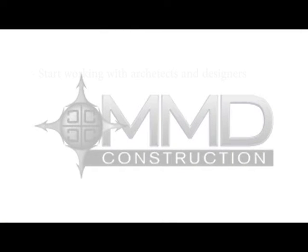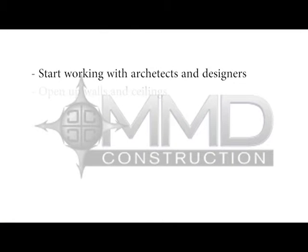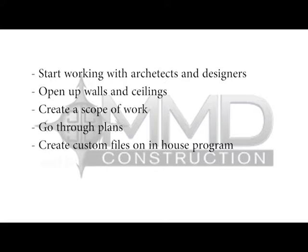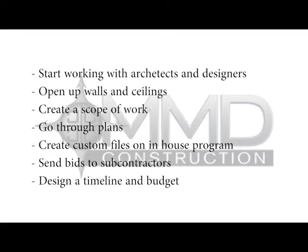So now that we have the PDA signed, it's time for our team to start working with the designers, doing our site visits, and starting the planning process to have a successful build. How we accomplish this is by starting to work with the architects and designers, open up walls and ceilings, create a scope of work for subcontractors to bid correctly, go through the plans and create a custom owner's responsibility sheet, create custom files in our in-house programs, send out to bid to multiple subcontractors, design a realistic time frame and budget, and then we can write up a proposal to get ready to build your project.